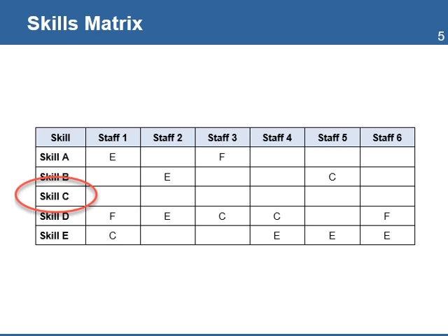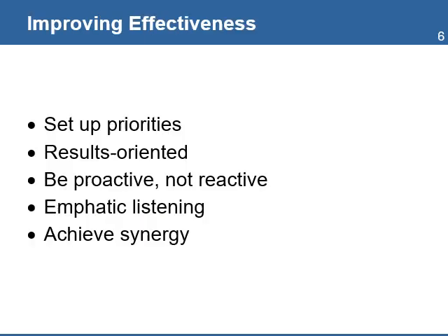When a specific high level of skill is needed by the project and is not present in the team, then it's necessary to find an outside subject matter expert to fill that position at the time the project demands it. This additional resource is usually a consultant who brings the skills that can be used immediately by the project. This approach sometimes is faster and less expensive than building the skills internally, especially if it's needed only once.